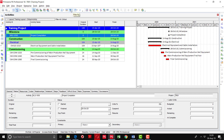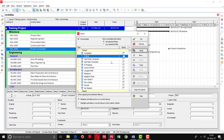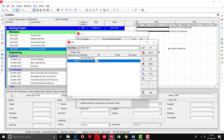Now we will go to the filter option again and I will tell you how to make a new filter. I will click on the 'New' button. I am going to show you the three-month look-ahead plan, so I will write the name here and give the title 'Three Month Look Ahead Plan'.